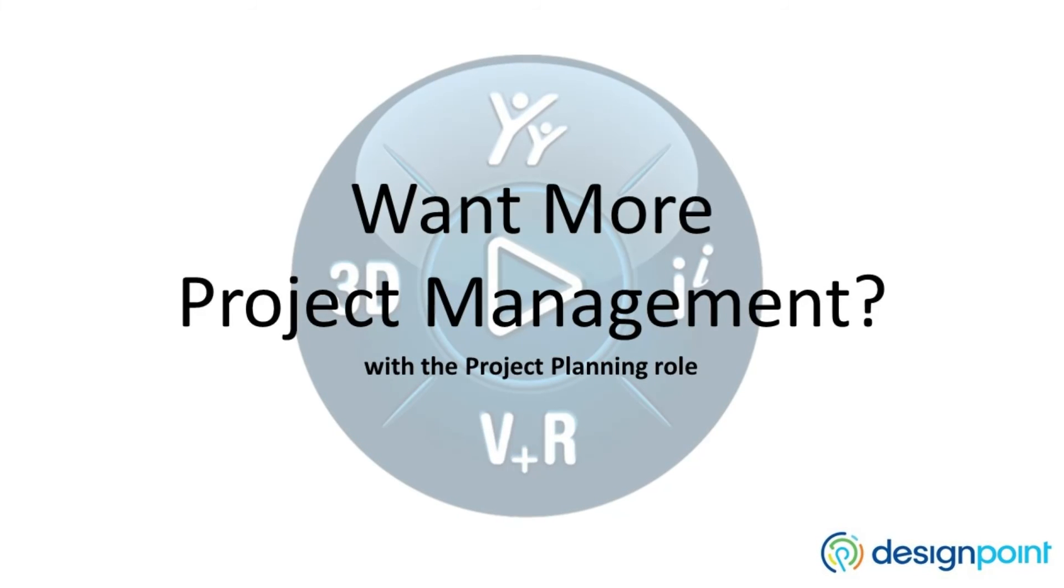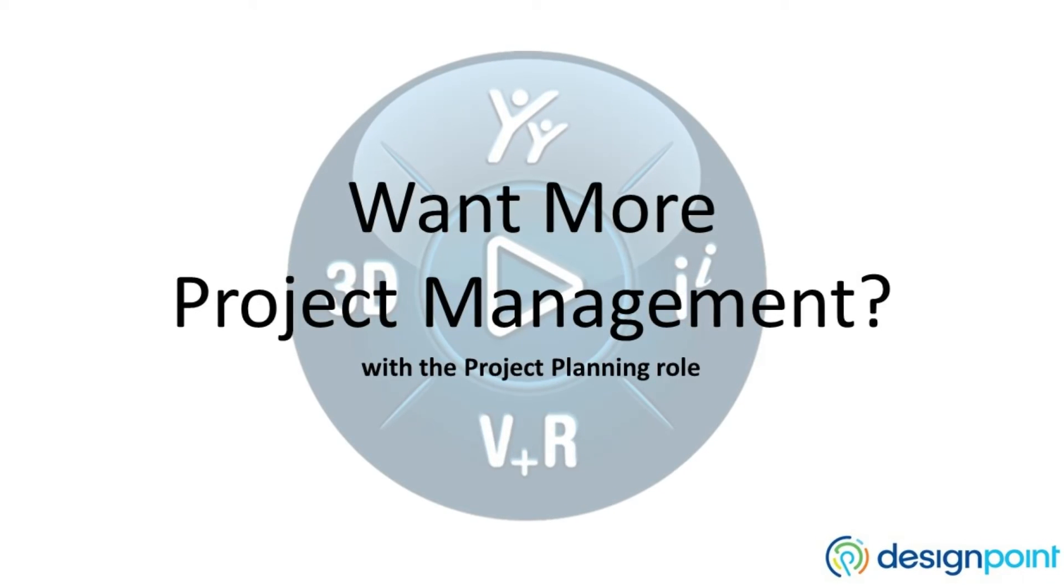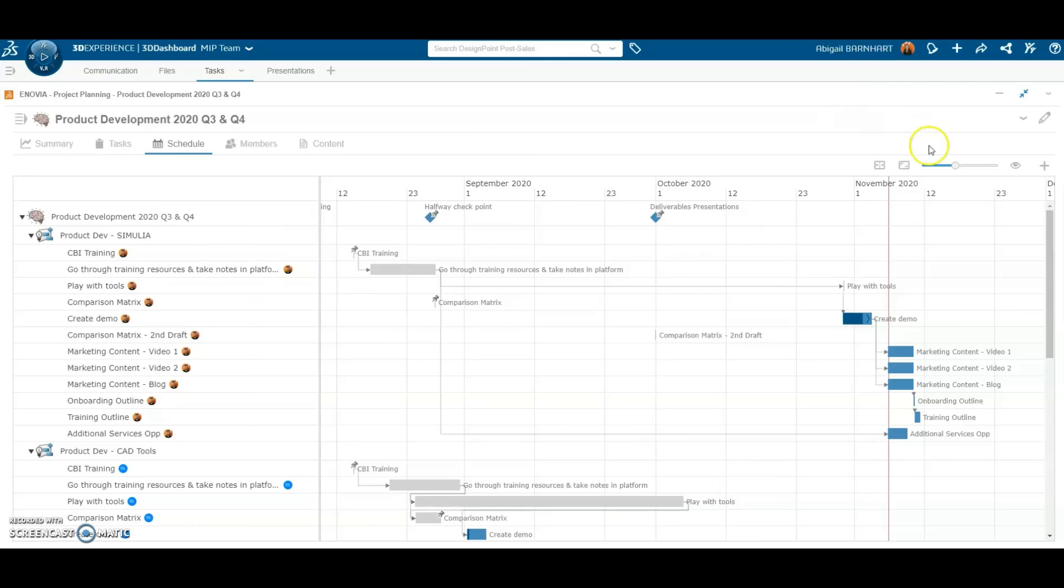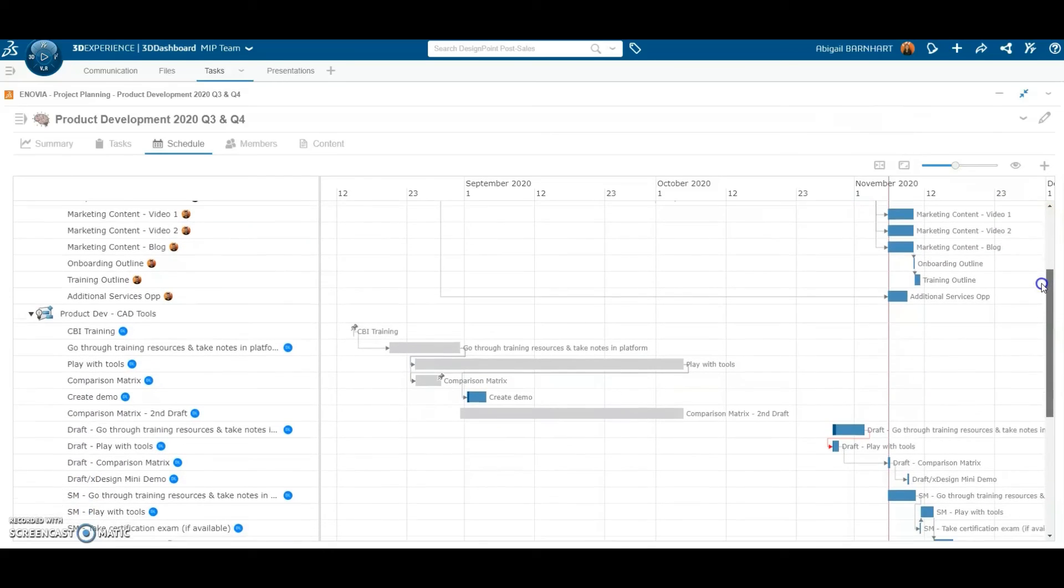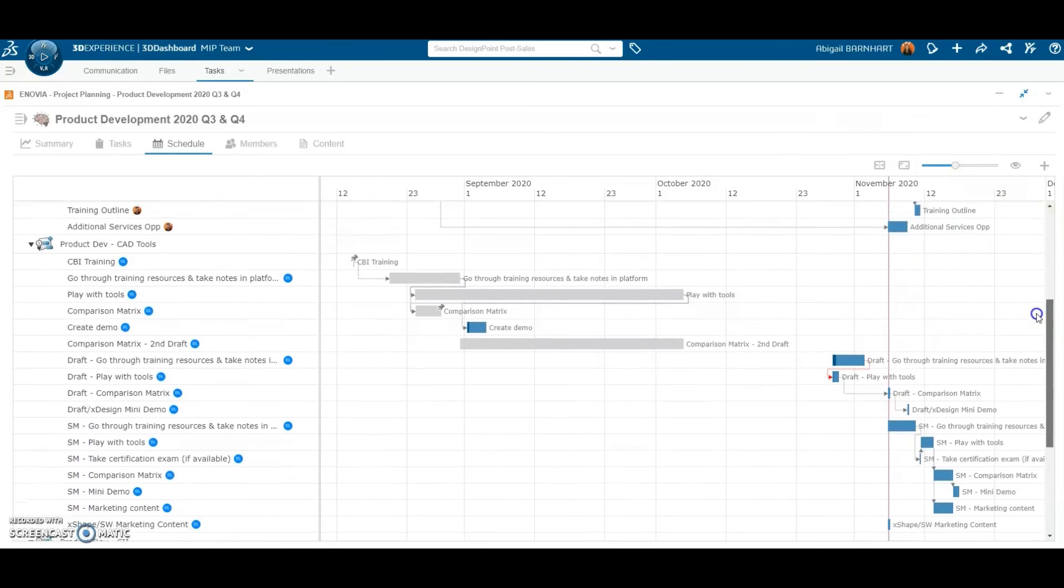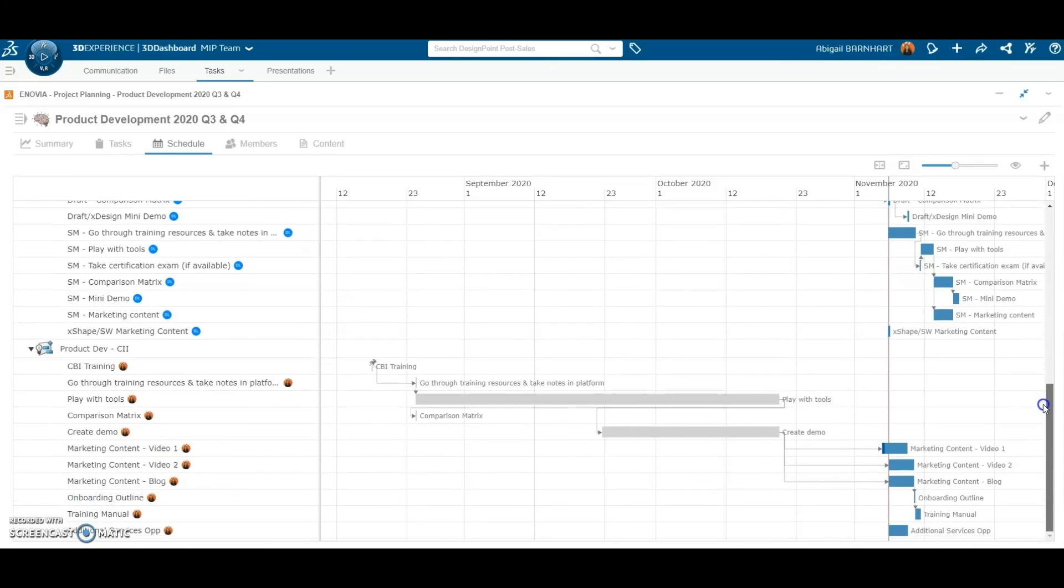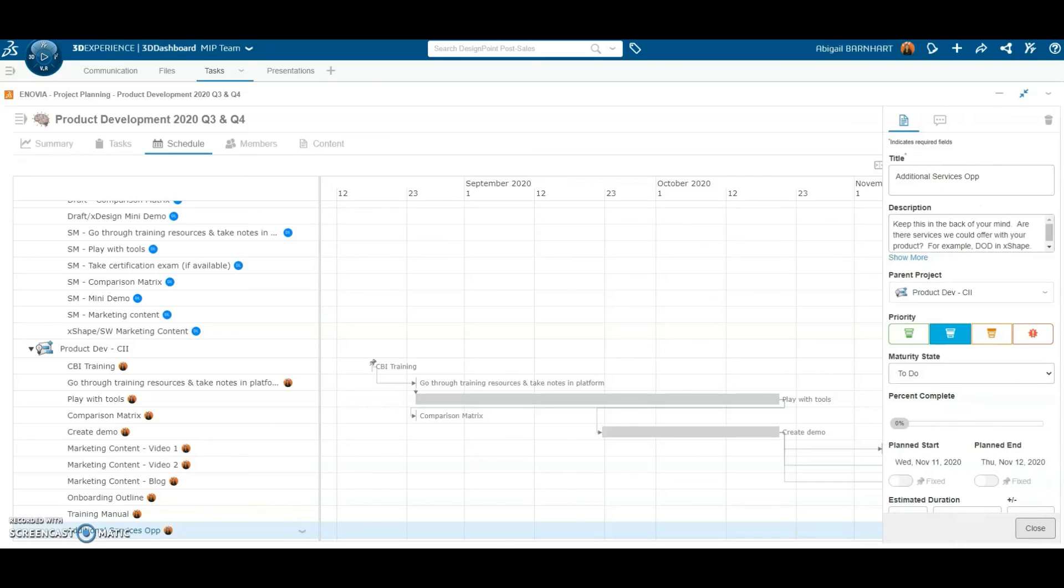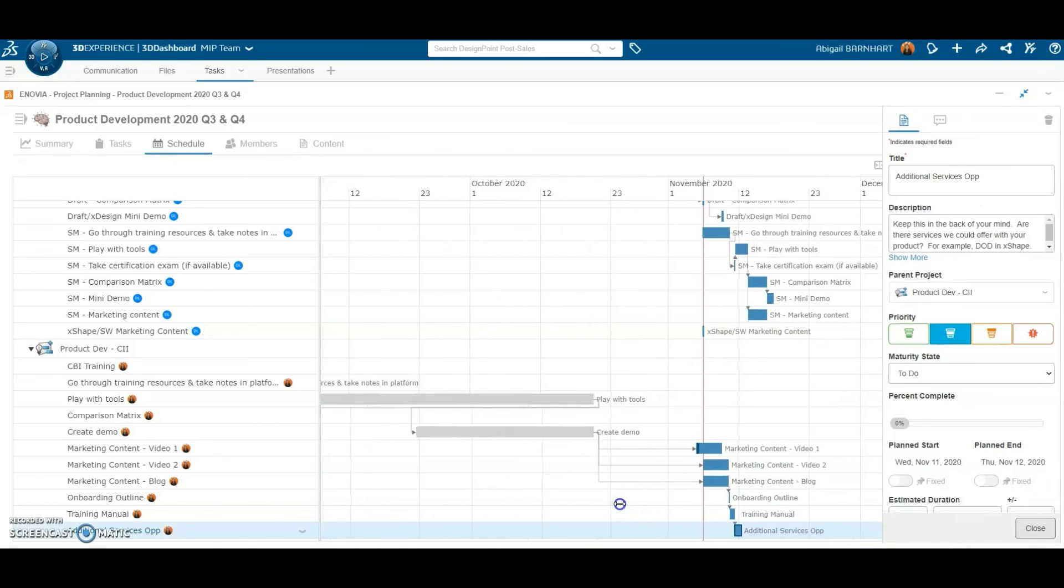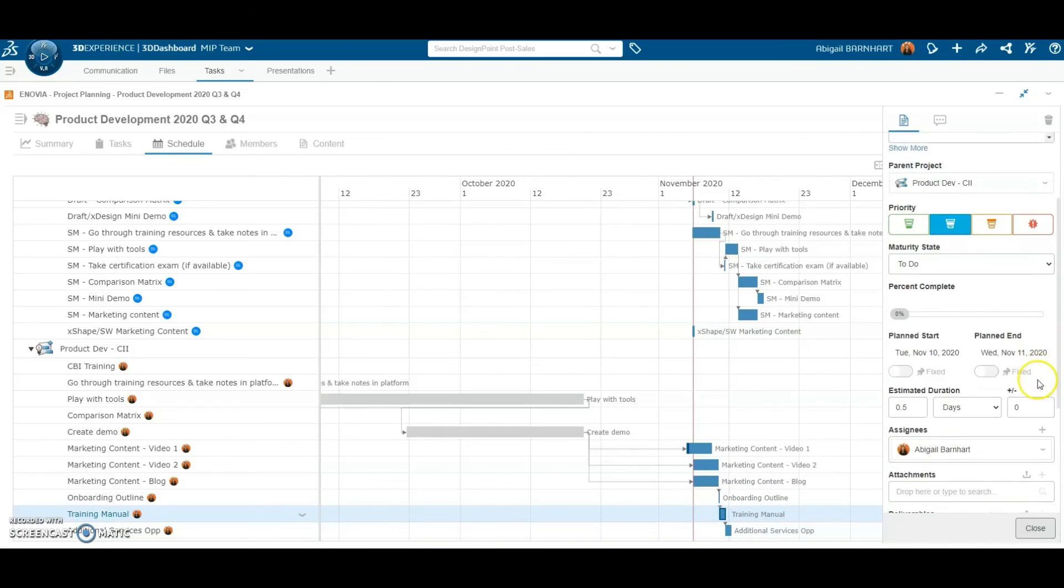You can get a higher level of project management with the project planning role. As you create tasks and specify how long each task may take, the platform automatically generates a Gantt chart for you. You can create task dependencies, which links one task to another. Now, if I update the estimated duration of the driving task, the dependent task will automatically adjust.